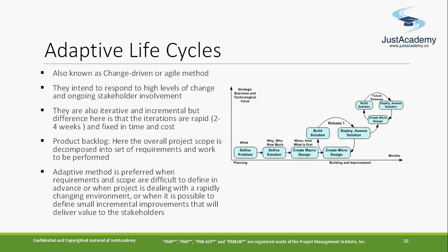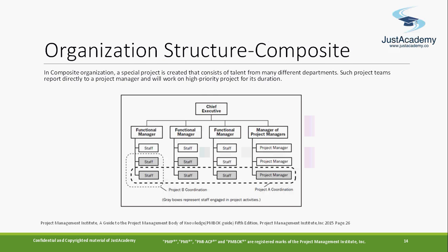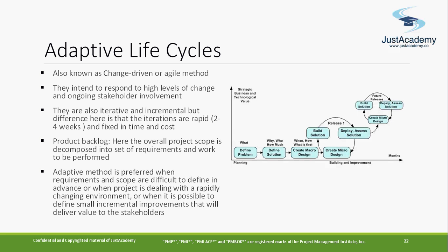Okay. Good. So perfect. Any question on this? No. Perfect. Great. Can you go back? Adaptive is preferred when the requirement scope is difficult to define in advance, and you don't have the full requirement, that's why a lot of changes are coming, right? When you are not aware of how the full thing looks, you initially take some requirements, break them down into user stories, and slowly you build it, you show it to the stakeholder or the customer, and they ask, can you add this feature also? It means they are not clear on the full requirement in one shot. But in the waterfall methodology, all the requirements need to be finalized initially itself. You get my point? I got it. Okay, that means you're adopting based on the scenarios. Good. So this is how it should be.